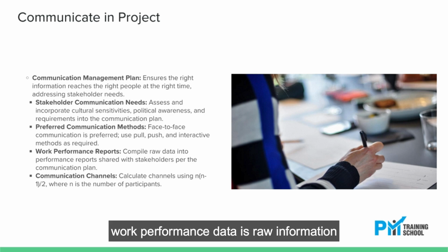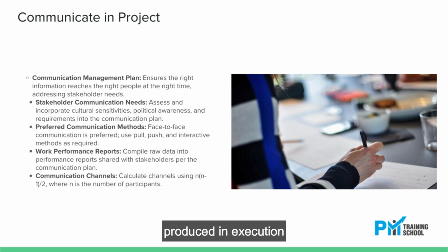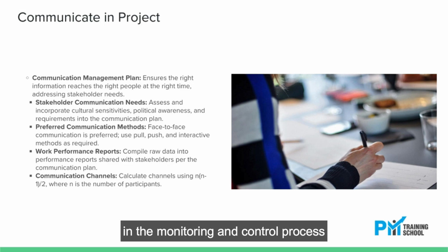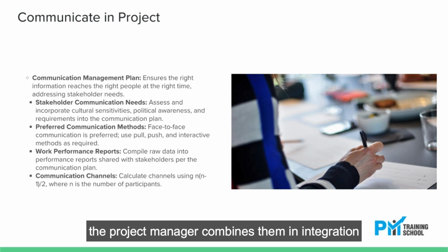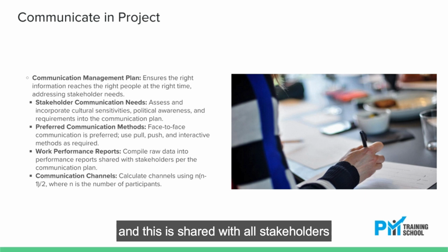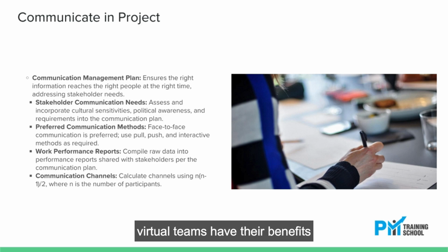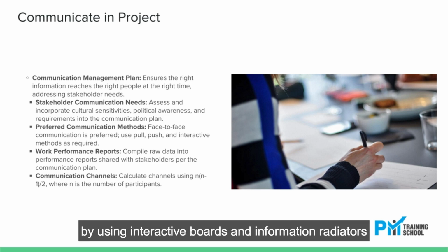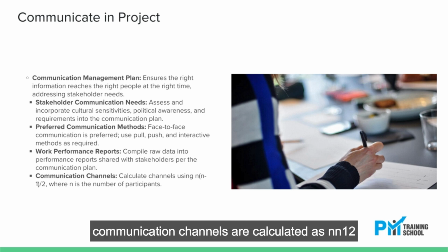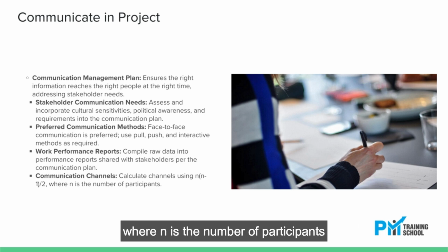Work performance data is raw information produced in execution, which gets converted into work performance information in the monitoring and control process. The project manager combines them in integration as a work performance report, and this is shared with all stakeholders according to the communication management plan. Virtual teams have their benefits, but their challenges must be addressed by using interactive boards and information radiators. Communication channels are calculated as N(N-1)/2, where N is the number of participants.